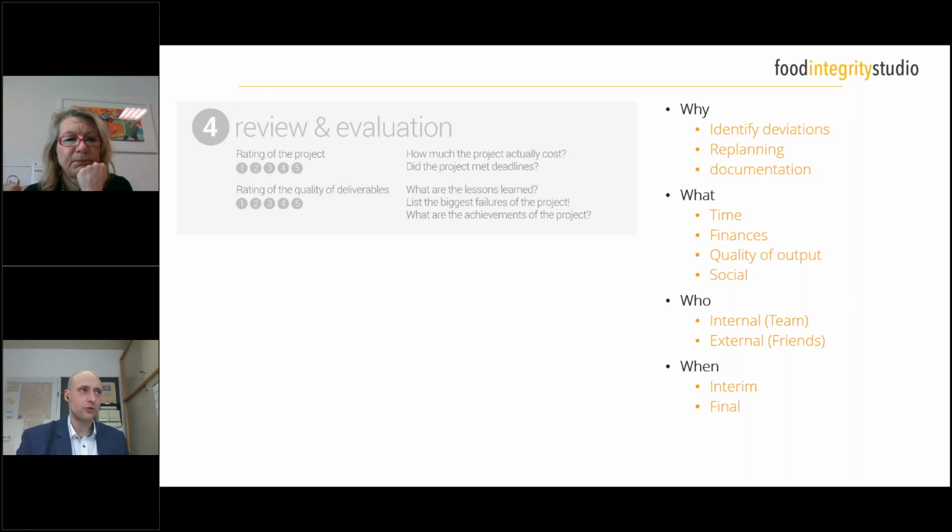So then there could be two ways: either you increase it to 150 degrees and then add the additional time you needed because there was a delay, or you leave it on 120 degrees and you do the whole replanning, and it might take you significantly longer to bake your cake. So then, in terms of the project timing, you have to do a replanning.